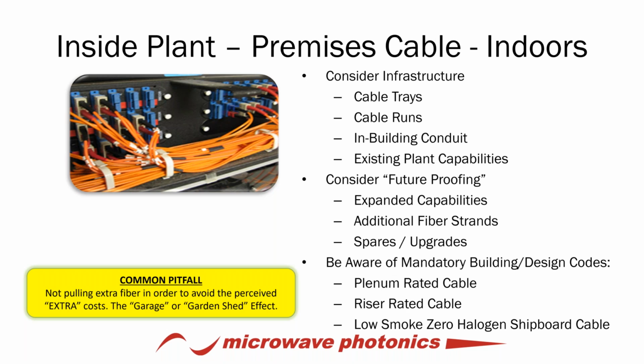It's what I call the garage or the garden shed effect. The minute you pull that cable, or the minute you build that garage, you realize, well, it's already too small. I've already used up the capacity. The deployment costs of pulling the fiber and routing the fiber and putting in the structured cabling, patch panels, the junction boxes, getting the clearances to run that through. By the time you lump in all of those costs and the labor elements, adding additional fiber strands for either spares or upgrades or future expansion really is in the noise of the total systems acquisition cost.